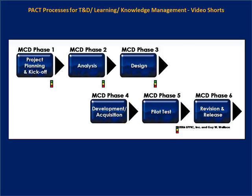The six phases of the modular curriculum development project are shown in the next graphic. Project planning starts off, and then an analysis of the target audience and the performance requirements, the enabling knowledge and skill requirements, and the existing training content. That would all then be used in a systematic design, then developed or acquired as appropriate, thoroughly pilot tested, and updated before it's generally released.